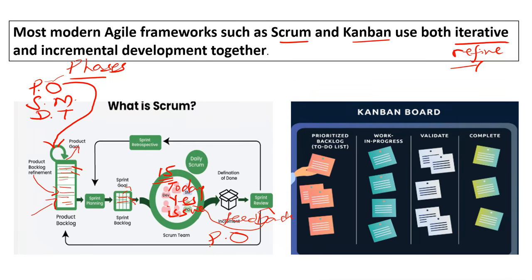First one is the product owner is responsible who will accept or reject the item which is created here. Second is the feedback, we receive feedback from the customers or from the stakeholders. And third important is here they will make the plan, the high level plan for the next sprint, right? Not in detail, high level what they have to do next. And when this sprint review is done, then is the sprint retrospective.